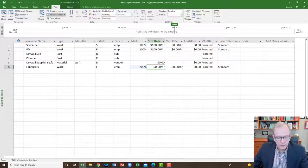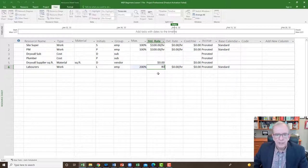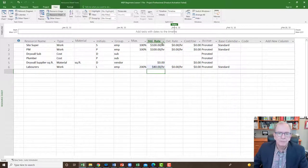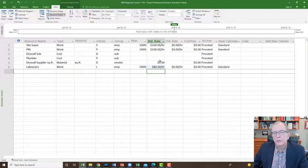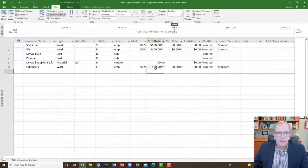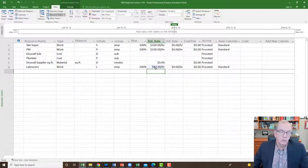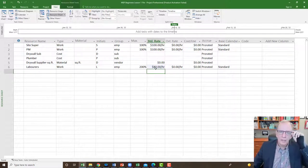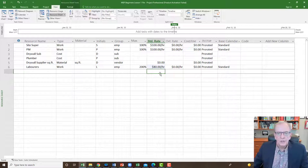I'll put an hourly rate of $80 for laborers. I'm putting the burdened rate — that's the rate including things like workers' compensation, pension plan contributions, holiday pay, union dues, and other add-ons. That's why that rate is there. This would all come from your budget when you want to apply costs to a cost-loaded schedule.